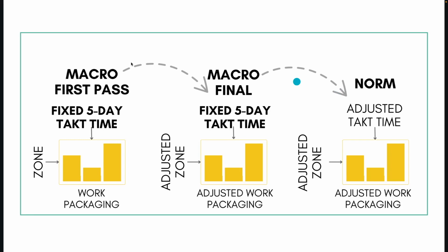And really the answer is when we put takt plans in a format in a 5-day, they really show up quite beautifully to where the entire team can see well on one page exactly what's going on, okay? And so we like to fix that 5-day takt time from a formatting perspective. Maybe one day we get away from that, but then you'll have your zones and your work packaging.